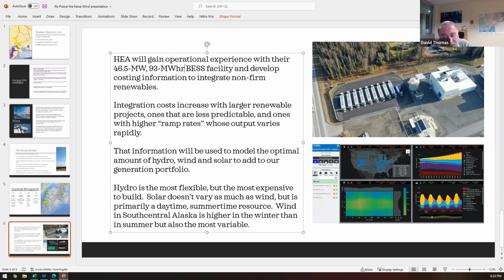I see that Hig has a question about if we had met towers up, but not everywhere. It does certainly inform us of similar sites, and the closer the site, the more helpful it is. But it's not bankable data. I mean, literally talking to the bank about the loan and also talking to the manufacturer, if it's not basically in the same project area. So if there's a site where we don't start collecting meteorological data, then we still have to start that 12-month cycle before a project could be finalized and financed and equipment ordered and starting to be shipped.